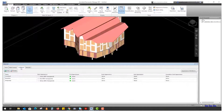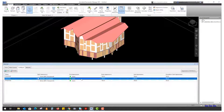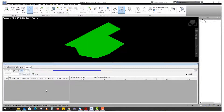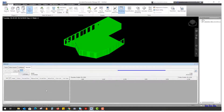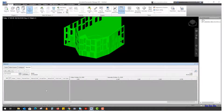In the Configure tab, you can change the color of how items appear at different stages — similar to how phasing works in Revit. By default, the end appearance of a constructed object is a solid green, and when it starts it's light green. For demolish, the end appearance is red — you can change that to any color you want. You can also include things like cranes, cement trucks, scaffolding models to simulate them arriving on site. Now I'll hit Play — our ground floor slab constructs, then the ground floor walls, then the first floor slab, and then the first floor walls.